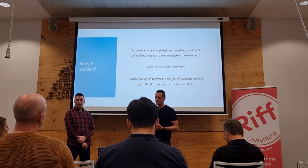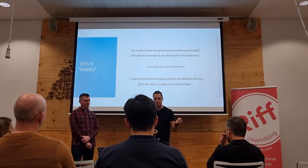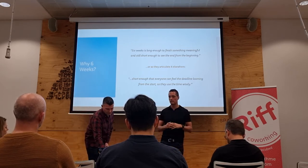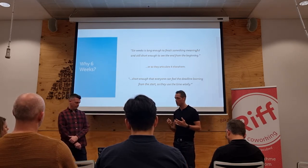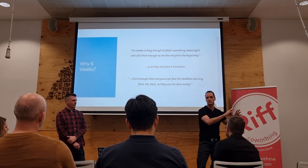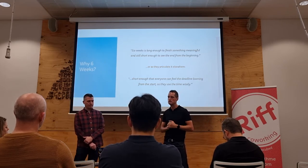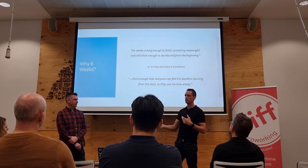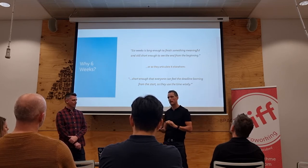We also have an all-hands stand-up every day. So we have 36 people, 27 in Perth, 9 remote, and we get the whole thing done in 15 minutes, generally just 10 minutes. And this works great because it keeps the team engaged. We all know what everyone's working on, which we find really healthy. It allows us to service any dependencies. Oh, Bruce, you're changing DNS stuff today. Well, I'm changing something that would affect that. We're on different projects, but that really helps us know, because at some point, things are shared. It keeps the team accountable to each other, and also makes sure that no one goes dark, because everyone can be like, hey, Bob just said the same thing for 4 days in a row. And sometimes that can slip through the gaps if you're in scrums.